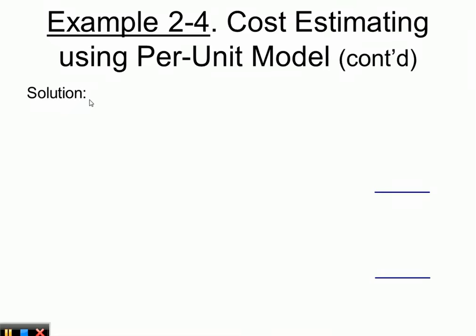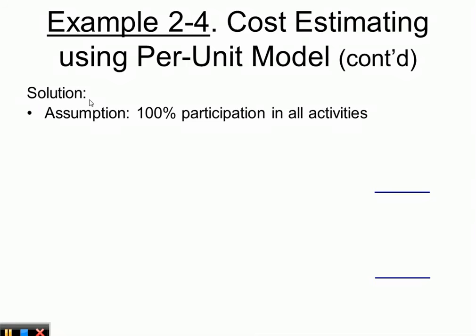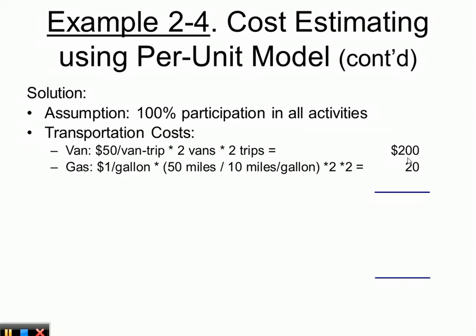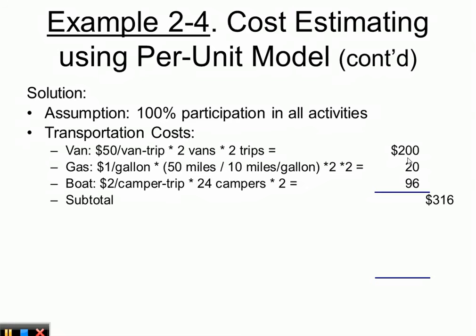Assuming 100% participation of all 24 students, here are the transportation costs. We need two vans because one van can only fit 15 students, and two trips for a round trip — so 2 vans × 2 trips × $50 = $200 for van rental. For gas: $1 per gallon × 50 miles ÷ 10 mpg × 2 vans × 2 trips = $20. For boat: $2 per camper × 24 campers × 2 trips = $96. Transportation subtotal is acceptable.